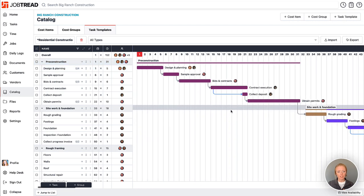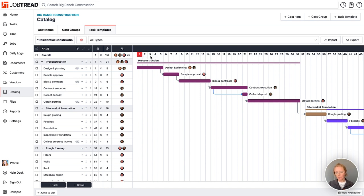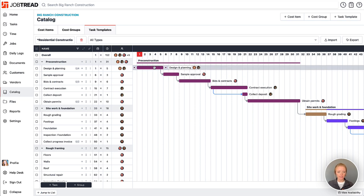The main difference here is that instead of seeing specific dates, you're going to see sequential days across the top here. So you're choosing day one, day two, day three, day four, and so on, and which tasks are scheduled on which days. And then you really focus on the duration of each of the tasks.